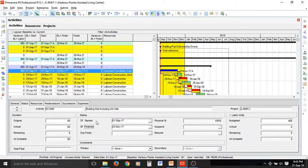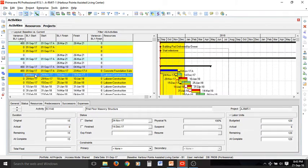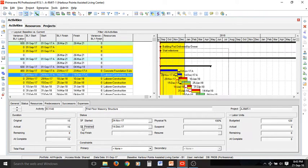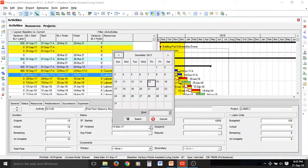The next activity is again entirely in the yellow zone so it has been started and finished. But in executing this activity we have experienced some delays, so let's delay the finish date by a week — select one week later as the finishing date.